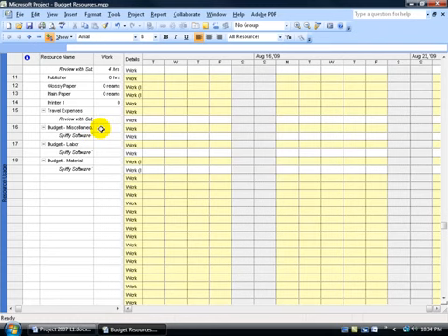I know it's budget miscellaneous, but I've assigned the type cost to it. I can still give it whatever wording I want, just as long as I have the type cost assigned to it. And you can see that in the resource sheet as we just went over. So I have my miscellaneous or cost, my labor, and my materials. Now what task are these budget resources assigned to? Well, again, it's the project summary task.